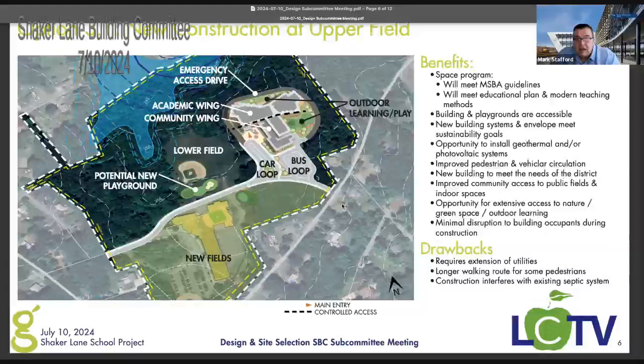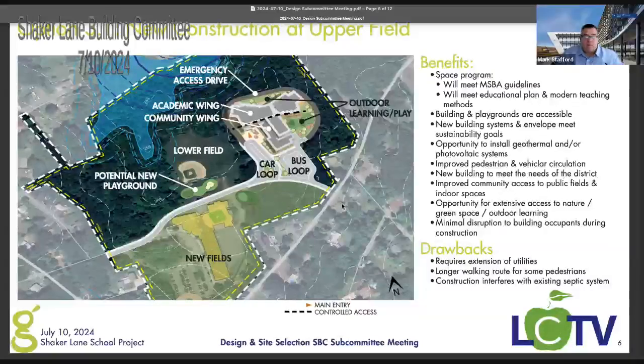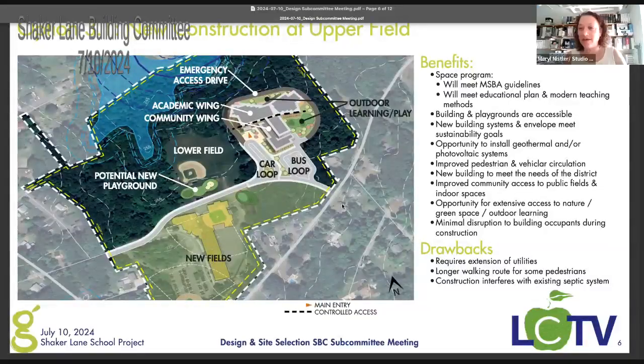It's 8%. They cap the site costs at 8%. For the town though, I don't know what the town would be, but for the budget, anything above 8% for site costs would be borne by the town. So trails and things like that, if it's within that 8%, great. If it's not, then they'd have to pick it up. Well, that's good to know. Yeah, we'll work with you on it.